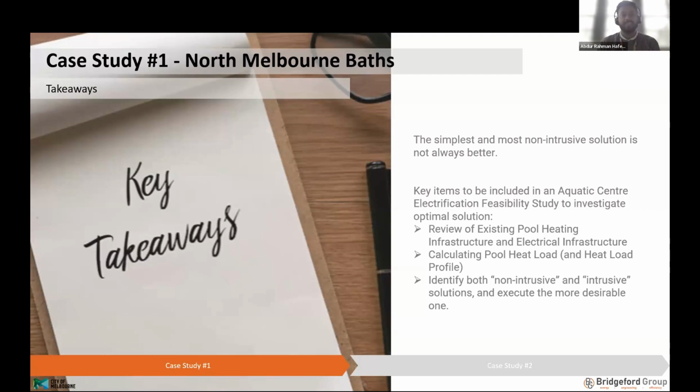I can think of another key takeaway, just with planning out your project and delivery: the lead times on heat pumps can be quite massive at times. If you are targeting a certain period of the year to deliver the project, you need to ensure you've got everything lined up and ready to go essentially the moment you have the opportunity.